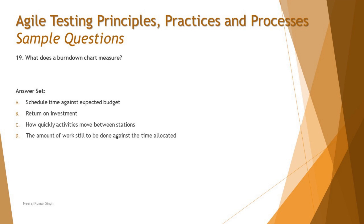We talk about the number of story points you started with, and how exactly the stories are getting burnt down over a period of time. At any point in time, this graph or report will show you the amount of work remaining within a particular iteration. That's where this report becomes most helpful.